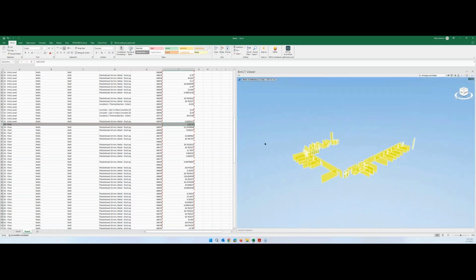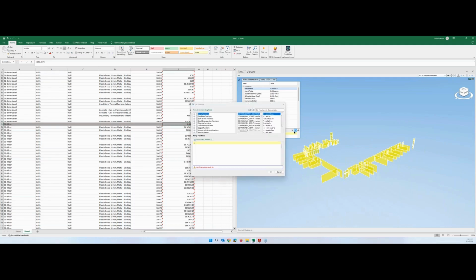Later on, you can put here the unit price, or you can open it here. You can even just use the formula options and create a formula that says increase the wall by 5% for material loss. So you can even apply it to the quantity which you would like to increase or decrease by using the formula, because we also provided formula functions inside here. You will be able to do that.